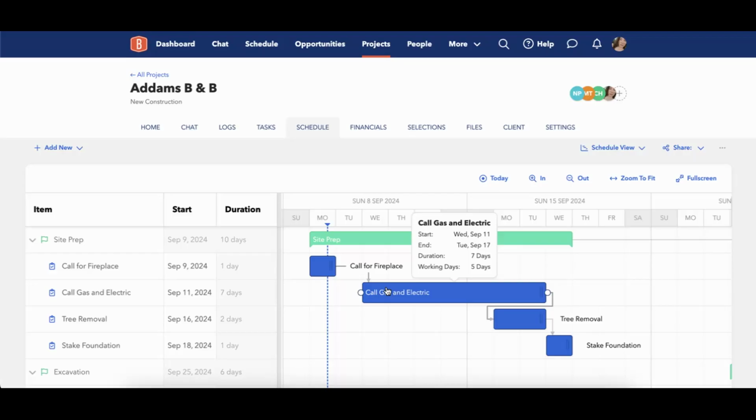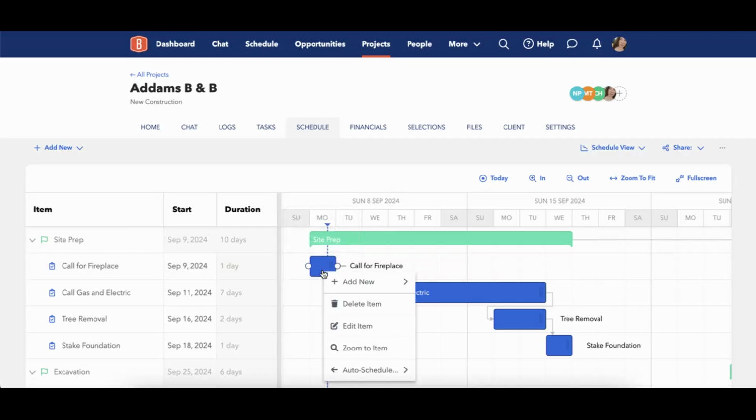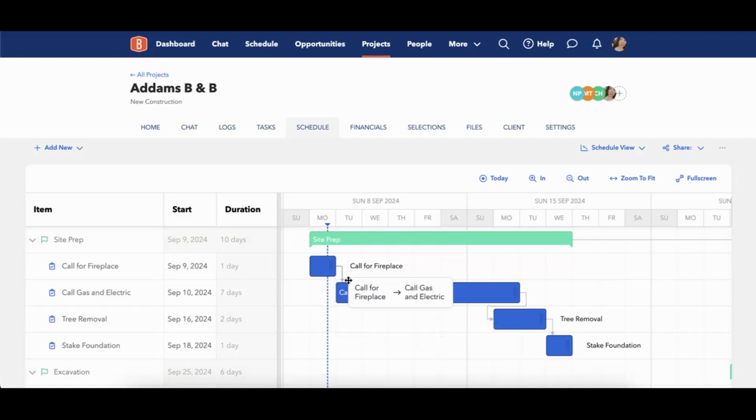So that's one of the things that some people get thrown off with auto mode. But again, I personally like auto mode because I can really easily reset that by just clicking on auto schedule and all successors so that it moves that back to butt up to it.